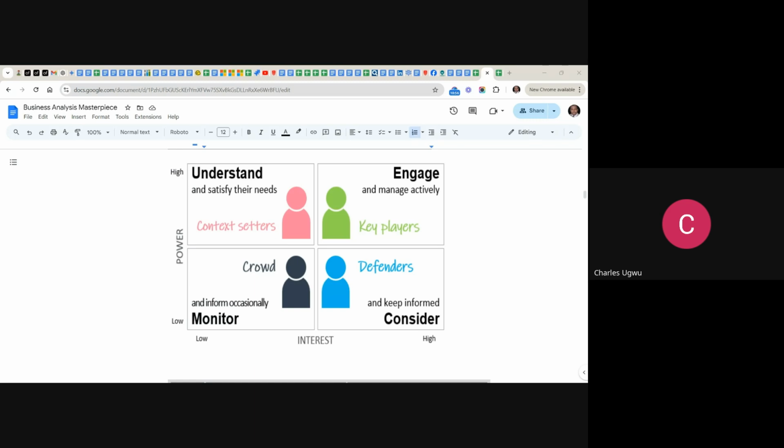We have a board, where so many companies have senior managers or directors. So the HODs will go and present the projects they want, and the board is going to evaluate the project to see if it aligns with the organizational vision. Then they approve the project, they approve the fund for the project.